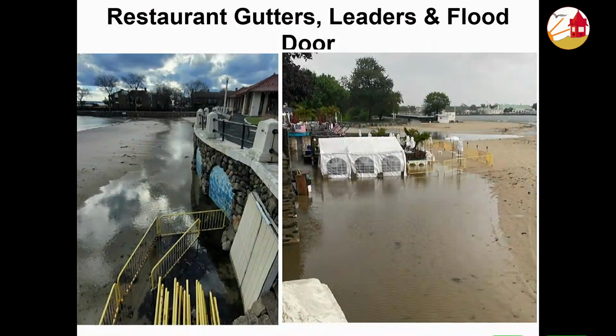Gary, you have still more to do. Yeah, the last topic on my agenda has to do with the Barley House. We've experienced flooding of the roof deck from rain. We have roof deck water that's just pouring down into the basement. As a way to mitigate that, we are going to replace the gutters on the clay tile roof of the Barley House, which is 3 sides.